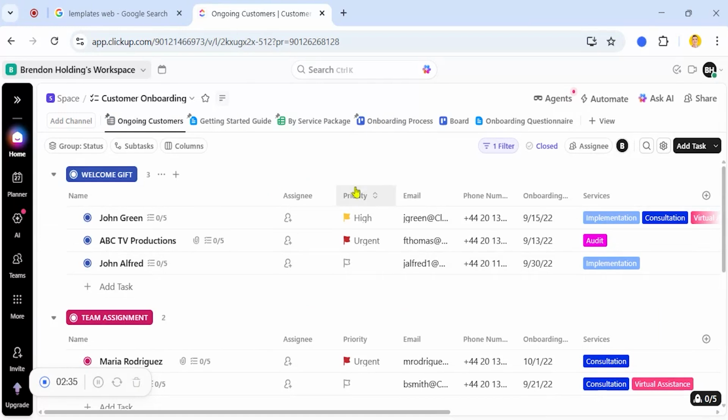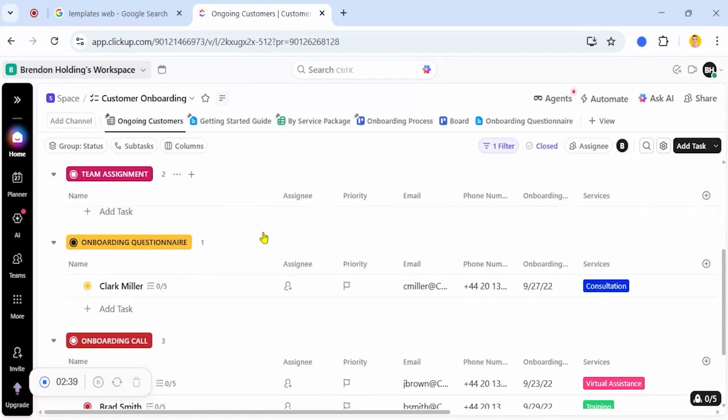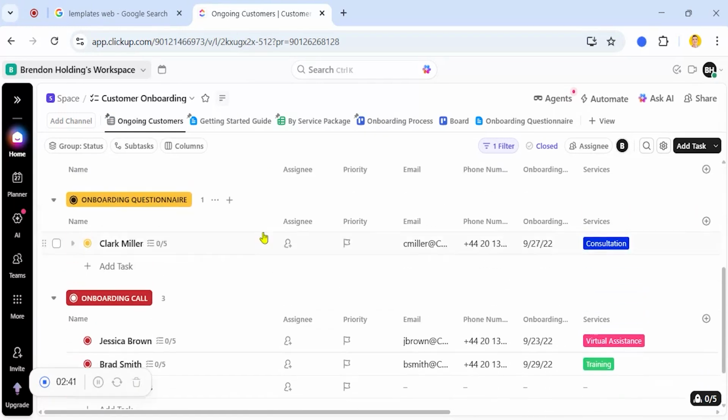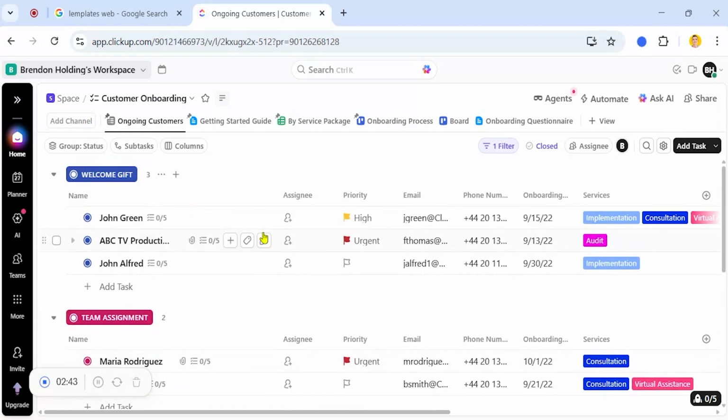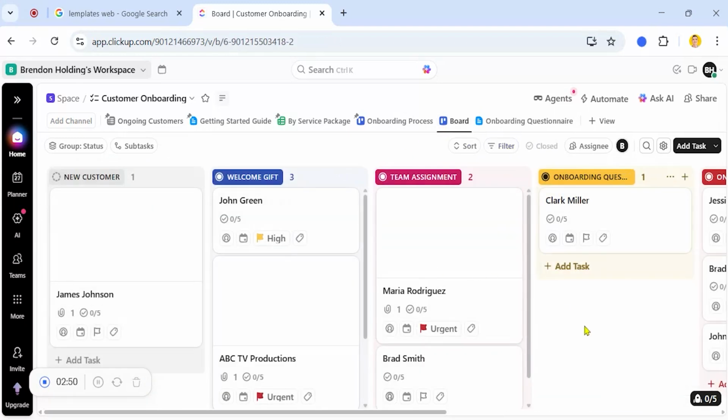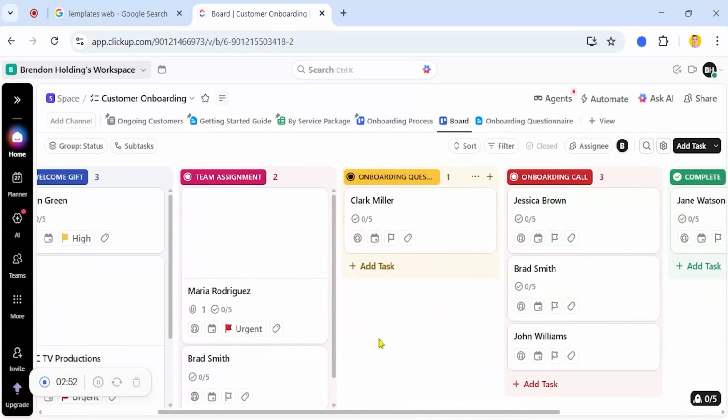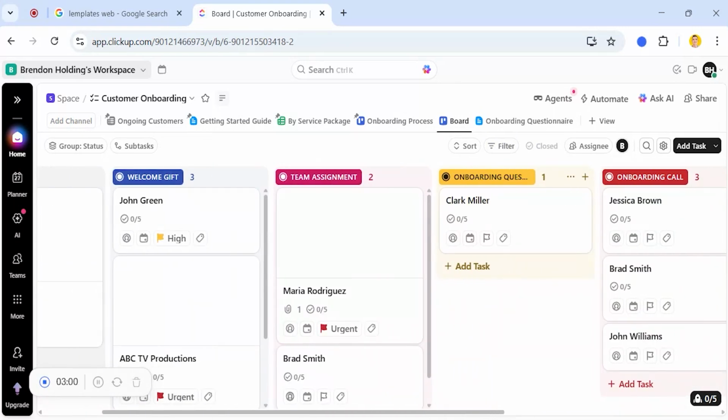Here's a simple board for the onboarding process with different stages built in underneath. But right next to it is another board with the stages next to each other. This only serves to create confusion. Instead of creating one board per client or per week or per person, use a board for a process and cards that actually do the work. This keeps patterns visible, and if tasks pile up in the same place, you'll see it immediately.